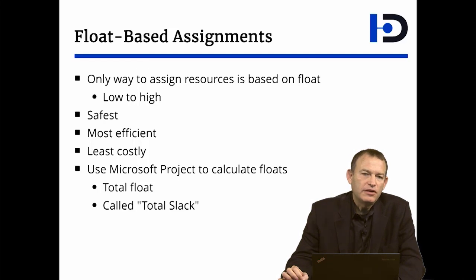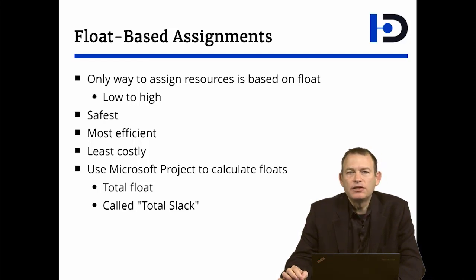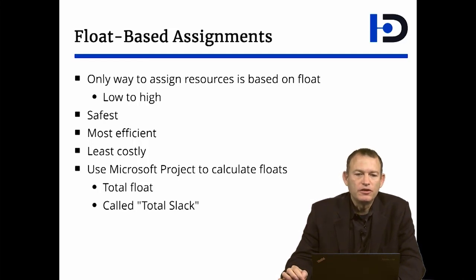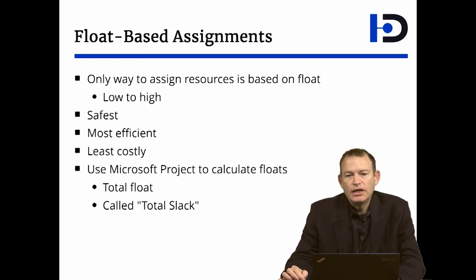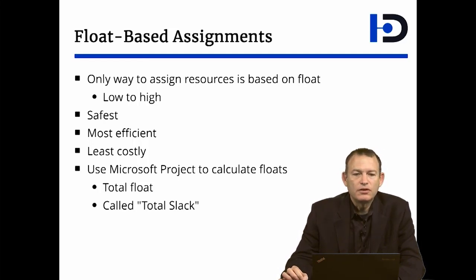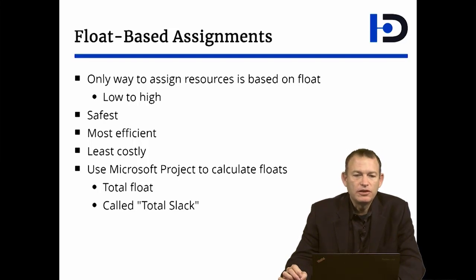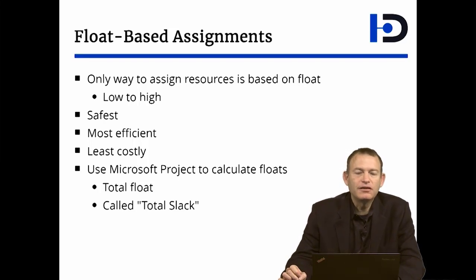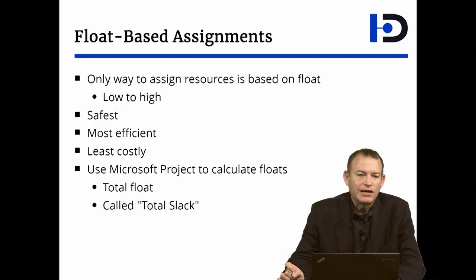The easiest way of calculating the float for your project is to use Microsoft Project. In float-based assignment and in general in project design, you only use total float. The way to calculate it in Microsoft Project is to add the column total slack. Microsoft just calls it slack as opposed to float.